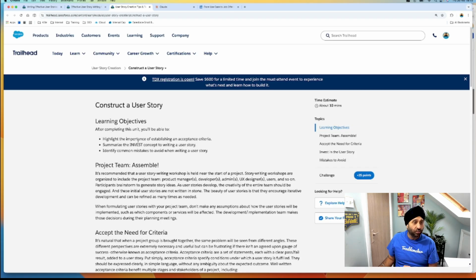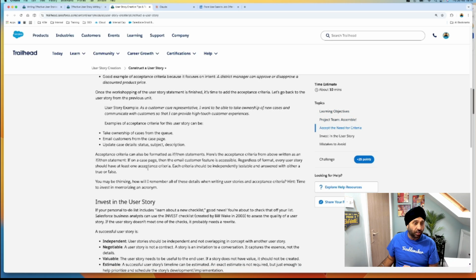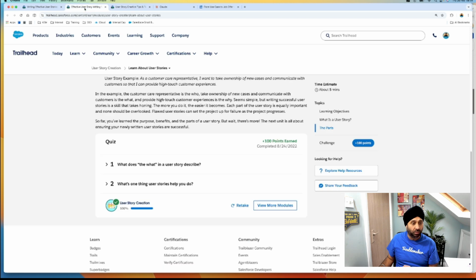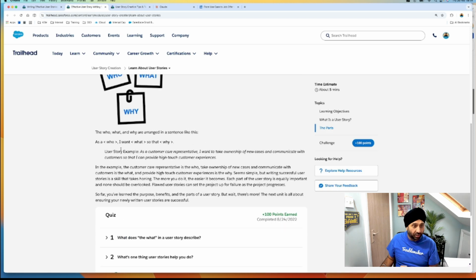Yeah, let's go back. This is the way you write the user story: as a who, I want, and so that. Look at this example: as a customer care representative, I want to take ownership of new cases and communicate with customers so that I can provide a high touch customer experience.